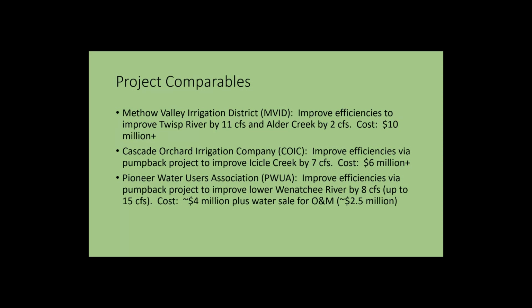similar in that we know with pretty good confidence how much the water acquisition is going to cost, and we have a pretty good idea that if you just did a straight up piping project, it would be $1 million, $1.2 million more expensive to do the piping project.